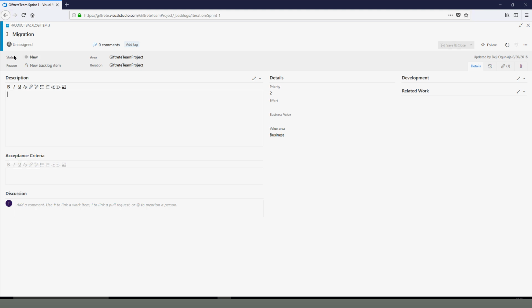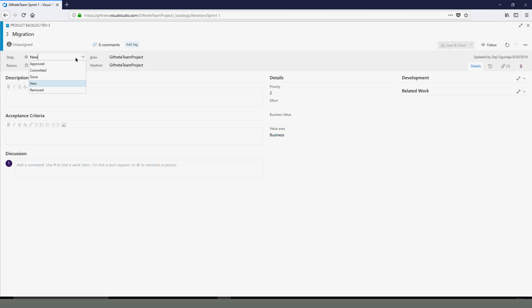So each story will have a title, which is the title of that backlog item, then also a description and acceptance criteria. And if you want to have a comment, or talk to someone, or add your own view about the story, you put that here. The story is in the stage of New once it's created. Then you can move it to different states. After New, you move to Approved. Approved means we've agreed, so that story goes to grooming. Once it's being groomed, you agree on the points and everything, which I'm not going to discuss today.